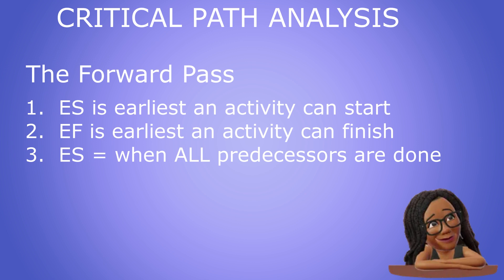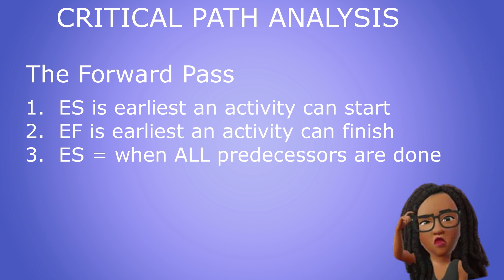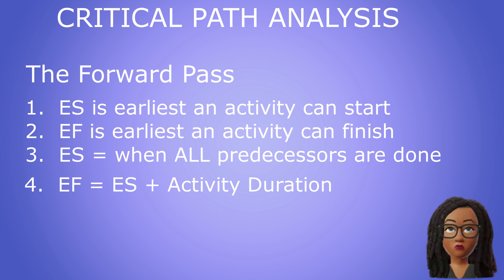Let's take a second to think about that. Now, the early finish of an activity is equal to the early start time of the activity plus the duration of that activity.